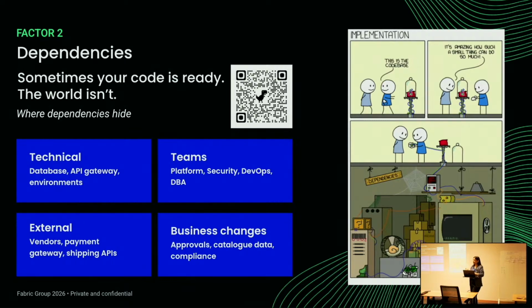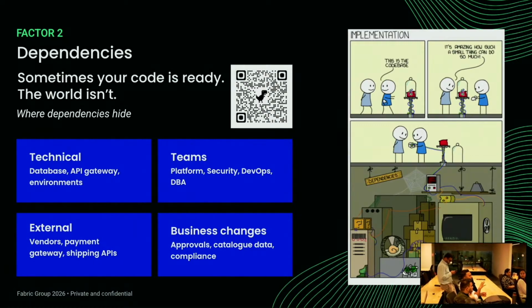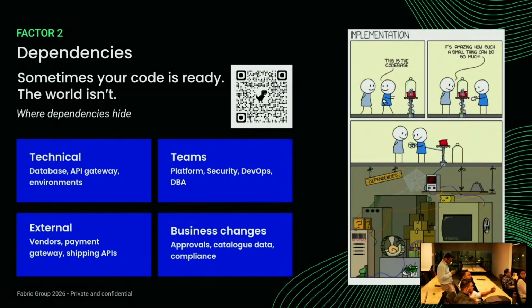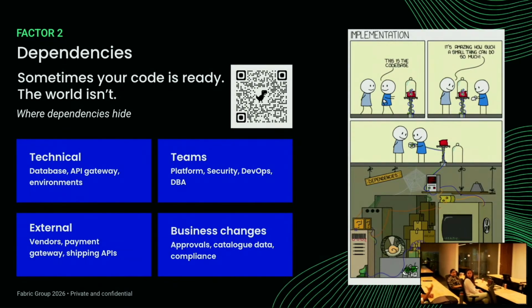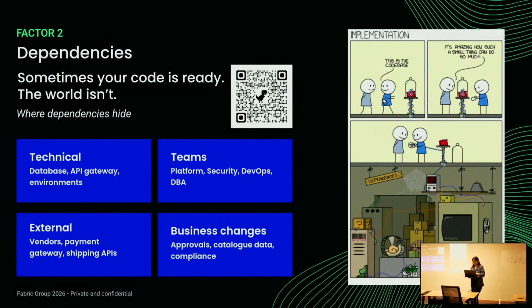If we can uncover these things at the very start while building a release plan, it helps us build a more realistic one. And also, I would like to add, there is also a delay from the mobile side. For example, if we have a mobile application on iOS and Android, then taking approval from Google and Apple takes long. As a business we go to them and say this is the release of our application and these are the bug fixes, but they have to check it from their own end and give the approval, checking whether it is compliant with their own compliance team or not. Correct, that is also one of the major factors.